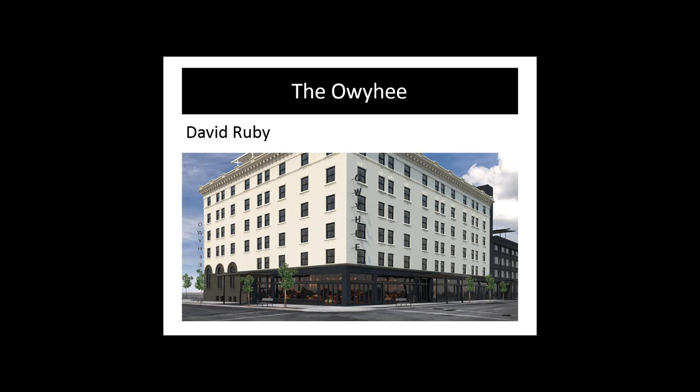Part of that was just bad records. I mean, there were really poor drawings available. Kobe and I were talking about that, really the as-builts of a building and what happens to it. When you're guessing what's under a floor or what has gone on, and no one keeps good records, it really slows down the process of investigating what might really be happening and how to improve it. You waste a lot of time.